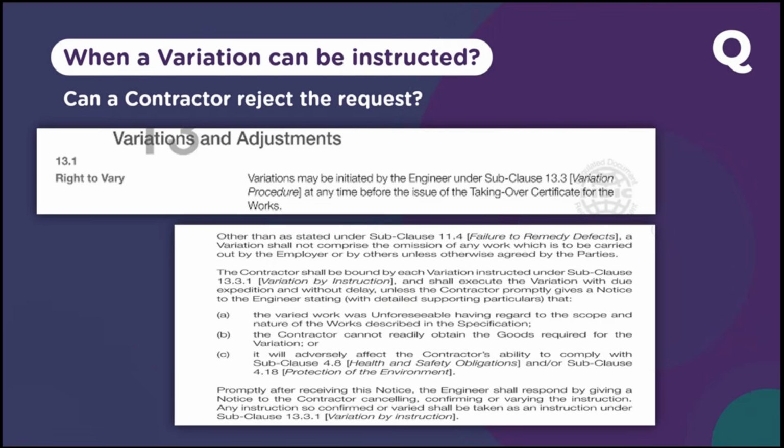So you should say, dear client, dear consultant, it's a long lead item. It's not readily available right now, and I need to search the market, get quotes, get the material submitted and approved. Only then will he start manufacturing, and I need a minimum of 4 months, and 1 more month to deliver also. Whereas my time of completion is only 3 months. So I cannot get it on time, or it's not readily available. So in this case also, you can say no to the variation.